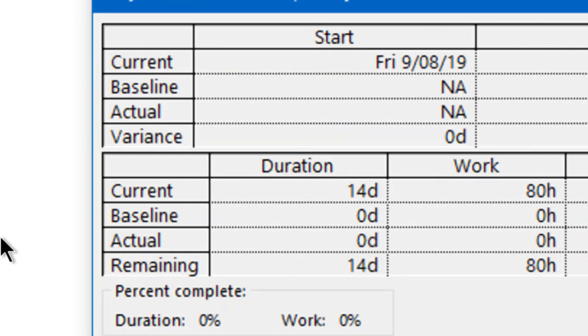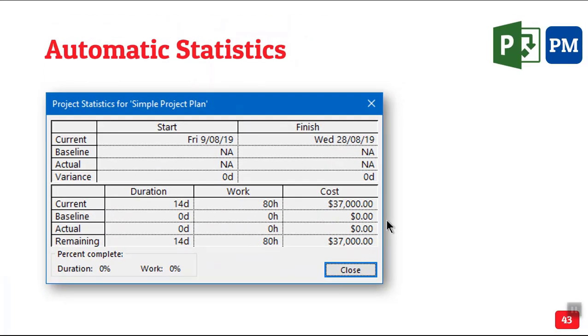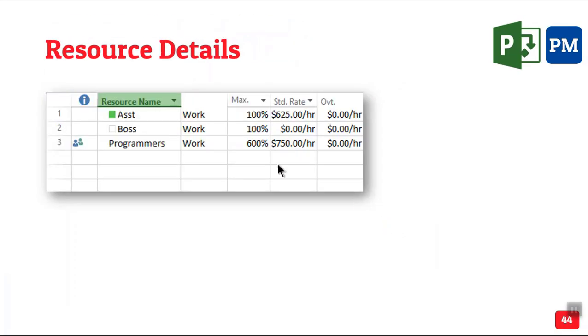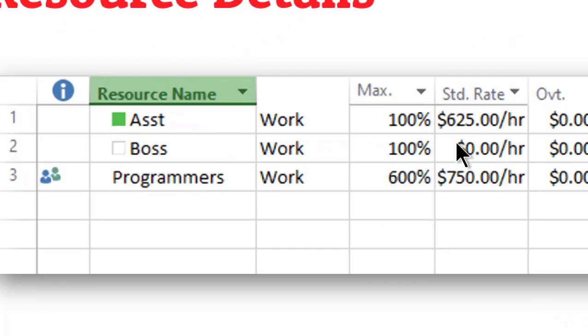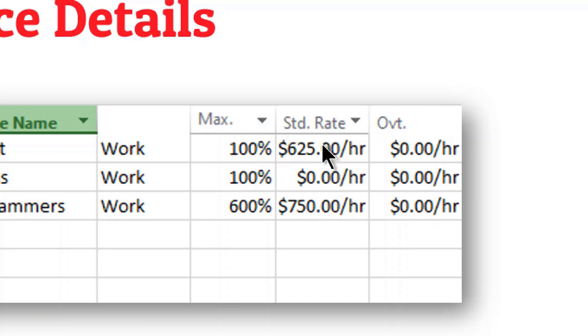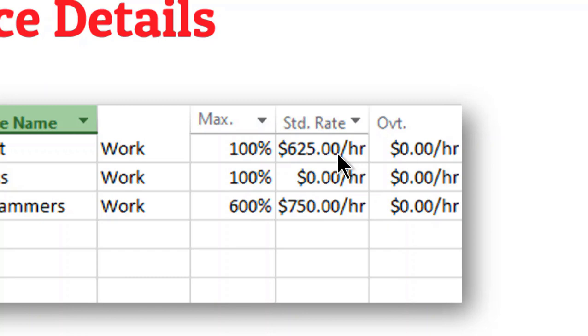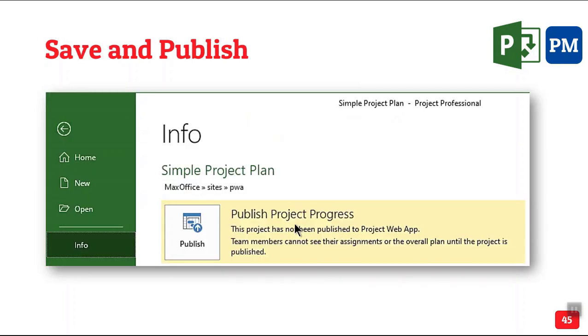How does it know the cost? Because when we added resources, we have given their rates. We can have standard as well as overtime rates if it is applicable. This can be in different currencies. Project supports multi-currency projects. So one user can be in dollars, another can be in rupees. It need not be per hour. You can say per year, per month, per week, anywhere it goes, and then you do the calculation. So this is how live statistics is available at any point of time.